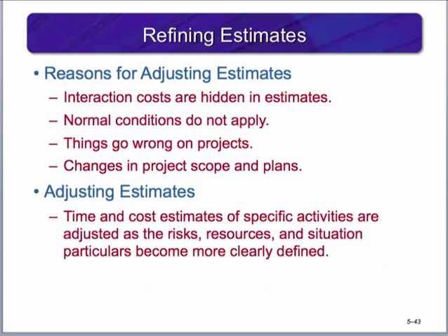There are several reasons why you might adjust your estimates. Interaction costs are hidden in estimates. Remember, tasks are to be estimated independently from other tasks. However, work on one task may have a dependency on one or more prior tasks. The handoff between tasks requires time and attention.